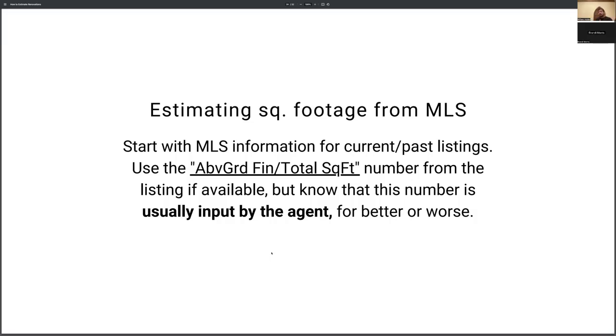So these could be benefits to you because then you could buy it for 1300 square feet and relist it for 1700 square feet because you have the measurements to prove it, right? But it also hurts you in estimating your renovations because it's a 1300 square foot house. You're basing your numbers on 1300 square feet. When you close, oh wait, this is a 1700 square foot house. These costs are a lot higher than I thought. There's a whole two extra rooms I didn't factor for here. And there's a walkout basement that I can add to the square footage, or they were counting the basement and they shouldn't have been because there's no egress. So these are all things to pay attention to make sure you're hitting the right square footage. But usually a good agent could tell you if it's right or wrong.